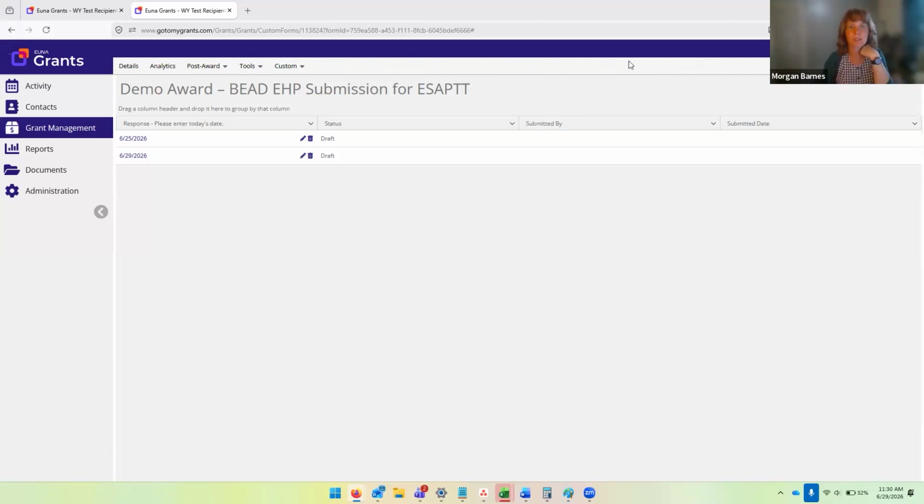Perfect. Thank you so much, Vince. The first question that has come in is, is the budget pre-populated or do we populate? That's from Michelle. And that is pre-populated, correct, Vince? Yeah, that's pre-populated based on your contract. We did that as part of the award configuration. And that is a breakdown, right, of the percentage of the total project award and the associated percentages of that milestone. So that is the budgeted amount per milestone.